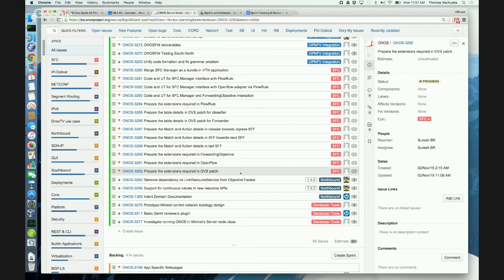Because if you were to look at the past sprint burn down, they're for the most part flat, followed by a cliff dive at the end of the sprint, and that's not very useful as a measure of how we're making headway through the sprint. So I would like to start using the tools more effectively, and so I encourage everybody to update the system as the work gets done.